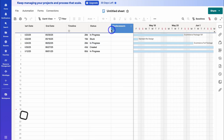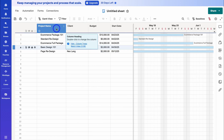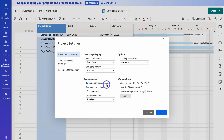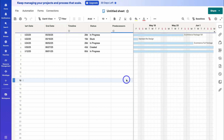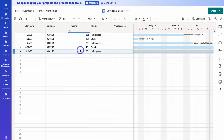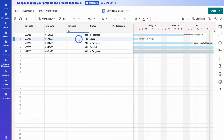As you can see, we now have a predecessors column. This is because we enabled dependencies inside the main column — we right-clicked, went down to 'Edit Project Settings', and enabled dependencies. What this means is we can add dependencies to each of these different rows. For example, maybe you're managing projects, tasks, or other types of items, and you want to ensure that one task needs to be completed first before you can move on to the next item.